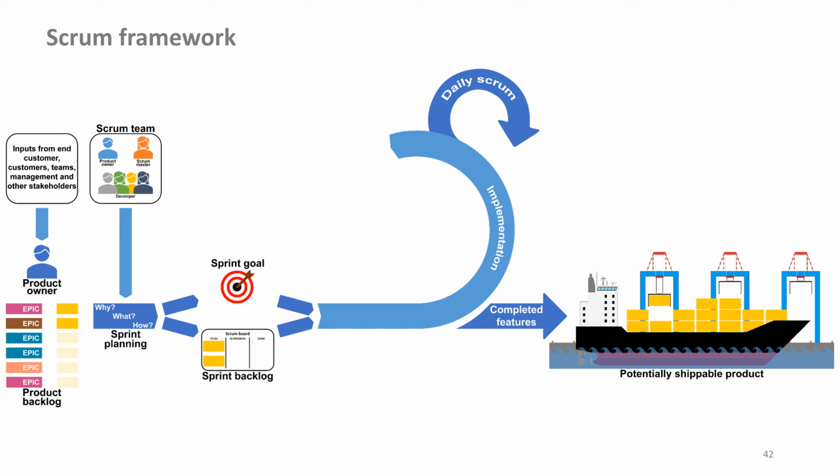What some teams have not yet understood is that if, for example, the test step is missing from the definition of done, then the product increment is not potentially deliverable. This is because it is not clear whether quality criteria have been met or whether it breaks anything. The product increment is presented in the sprint review.